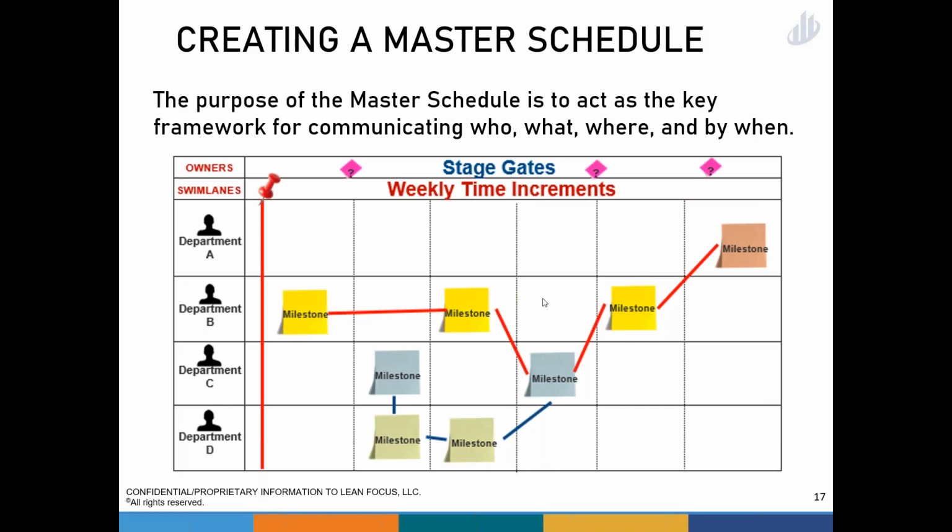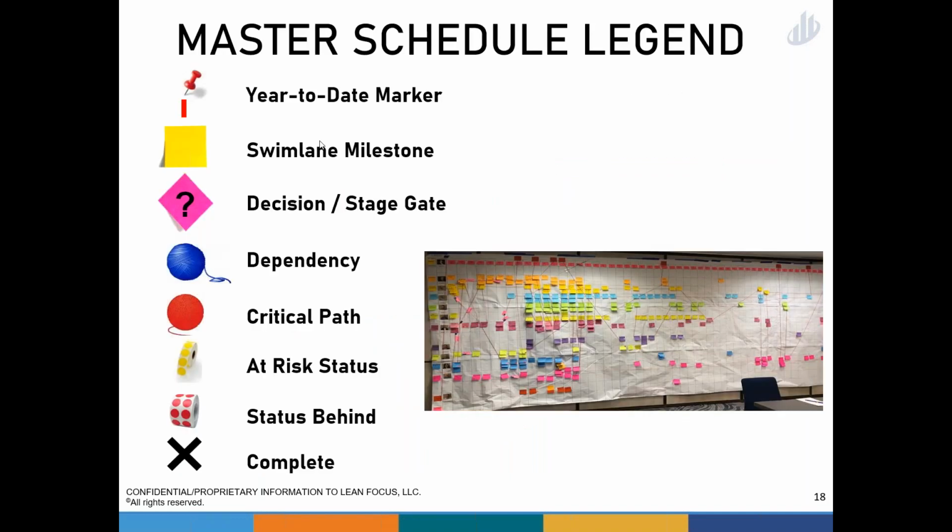So many of the programs I was involved in as an engineer, you'd actually get interviewed for your role. So you have this deliverable, you're in this function, what's your plan to do that? What are the different things you need to do, and who do you need help from in order to be able to pull that off? And the program manager would be interviewing and building this backwards, working with the team to get that in place. Doing that in a workshop environment can be very helpful to get that dialogue going cross-functionally and be done much more efficiently rather than through serial interviews, for example.